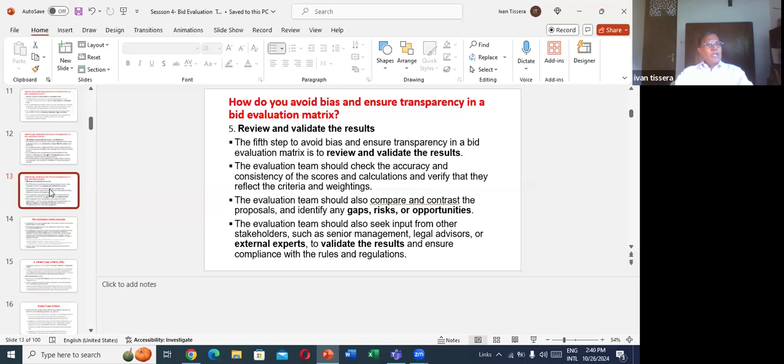Even if the joint committee does not agree on an acceptable recommendation, the head of the department can forward that evaluation to another evaluation committee, right? If some factors are there only. Or get the opinion of a third party, like external consultants, who give a report. Even if it is not agreeable, he can say this recommendation is not acceptable, we'll have to rebid, calling rebid or calling new bids.